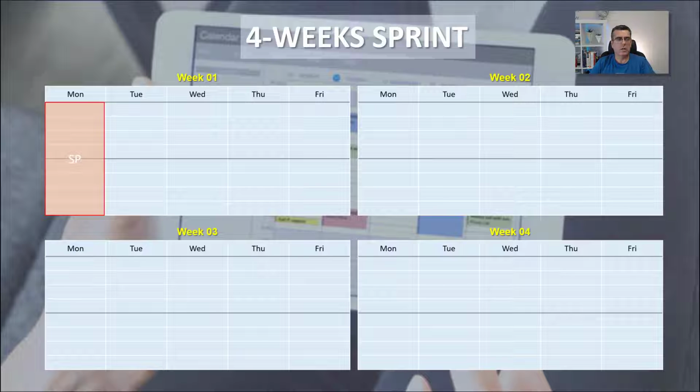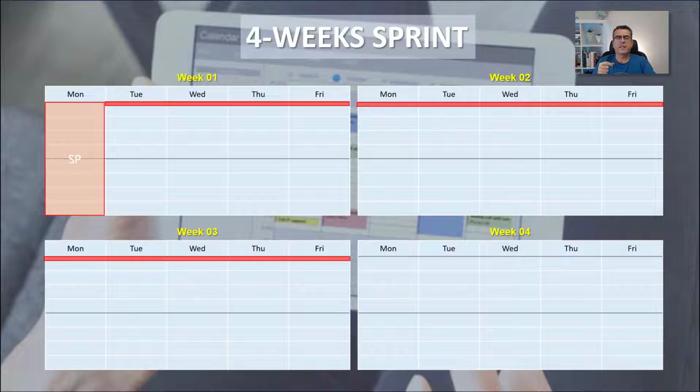So far, so good. Now, after scheduling the sprint planning, we're gonna see the daily Scrum. Once you finish the sprint planning, we're gonna start working in your sprint, and you're gonna perform all daily Scrums. It takes about 15 minutes every day. So we're gonna schedule these for 4 weeks until before the last day of this sprint, because in the last day we're gonna present the sprint review.